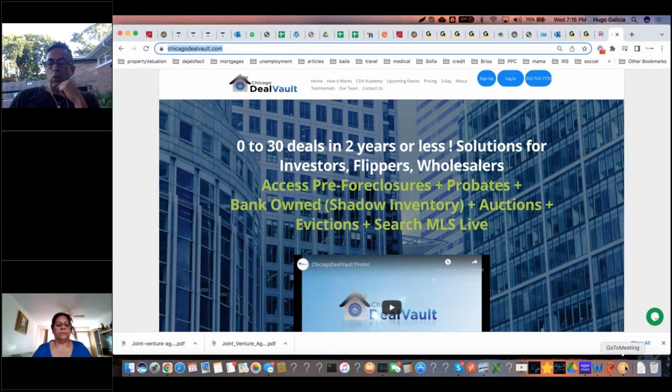And then you always want to pay contractors, if possible, with a business credit card. We've had the case where we hired this heating and cooling company to redo the entire HVAC system from the ductwork, the water heater, furnace, condenser, and guess what? They didn't complete the job. They left us in the middle of the project. They did most of the ductwork and then they left. So guess what? We ended up paying them with a credit card, so we filed a dispute. So we ended up getting our money back and we had to hire somebody else. So if you can pay with a credit card, you're going to be in good shape.